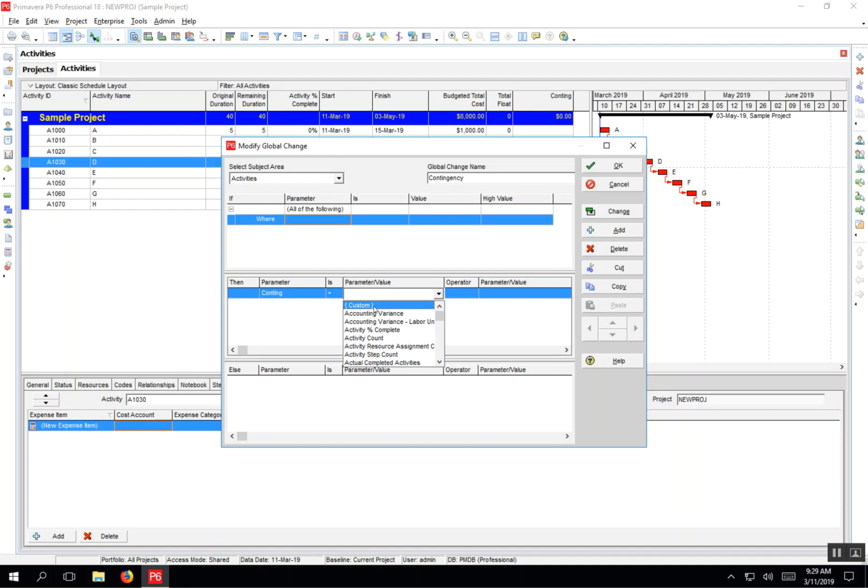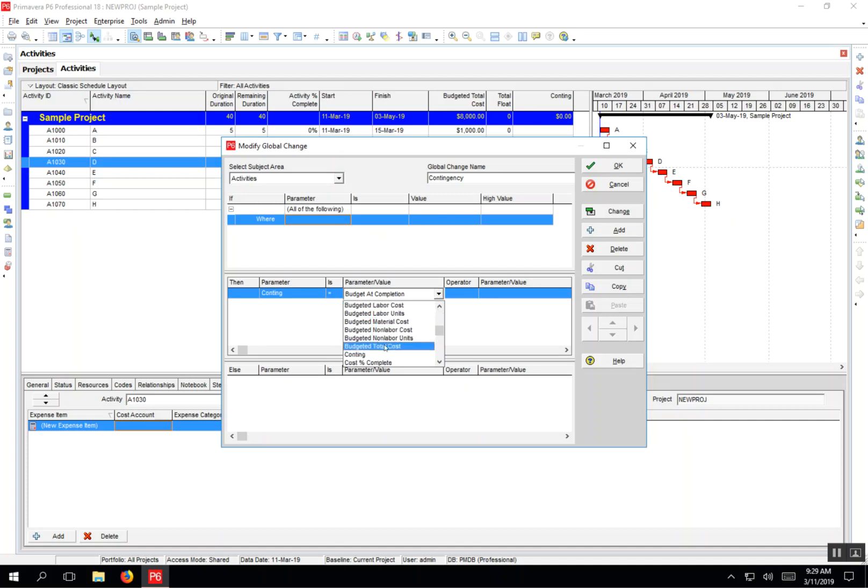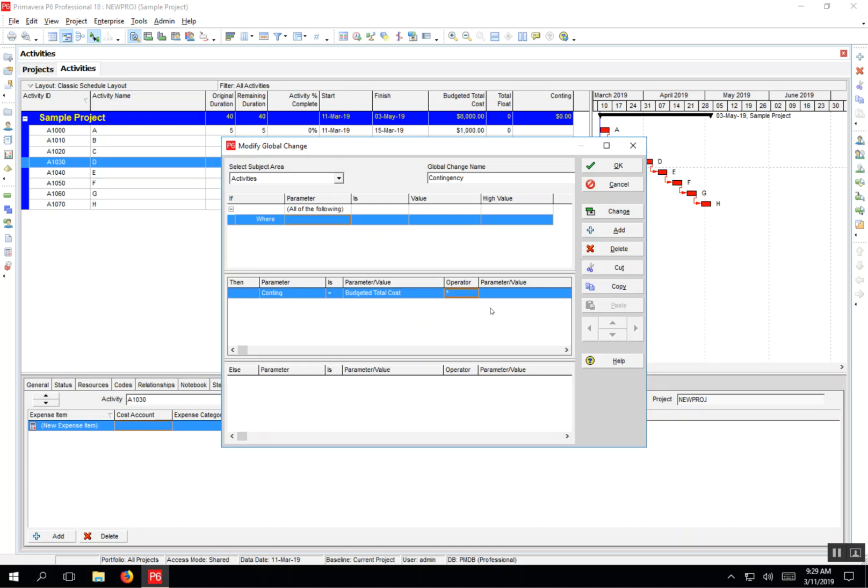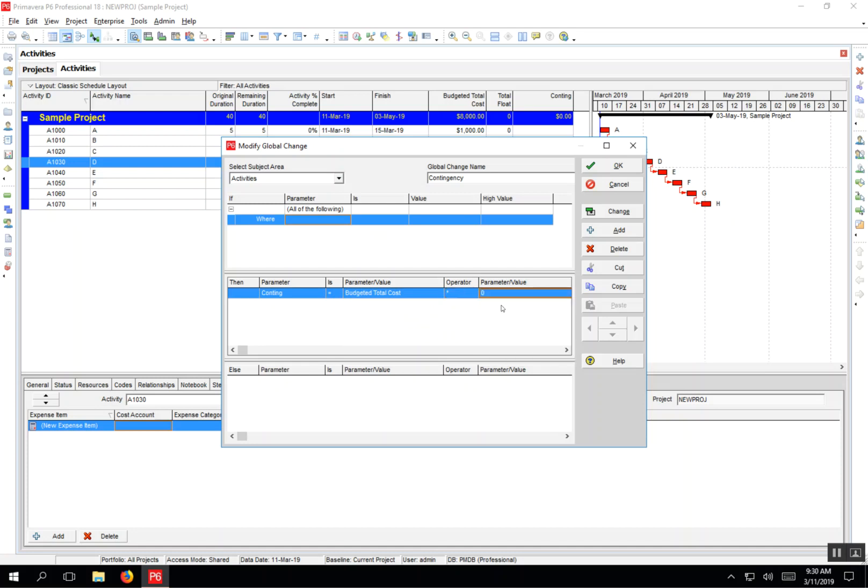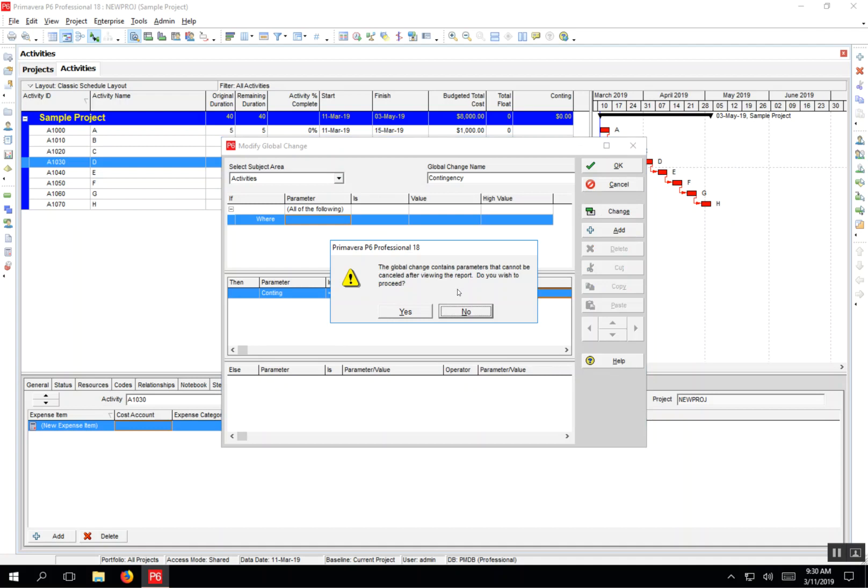budgeted total cost multiplied by—that's my operator—and then the parameter value is going to be a custom value of 0.1 for 10%. Once I do this, I can go ahead and run that change.